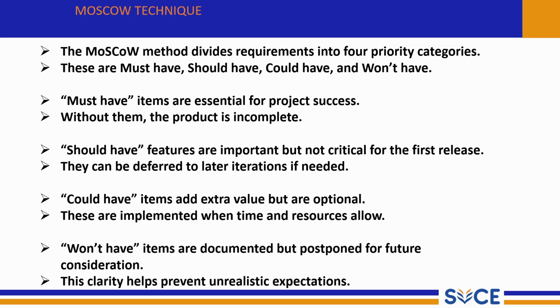Should have features are important but not critical for the first release. Should have features are important but not mandatory for the first version of the product. They improve the quality and user experience but are not essential for the basic functionality. They can be deferred to later iterations if needed. If time is limited, should have features can be moved to future sprints without affecting the success of the project.